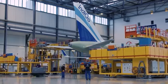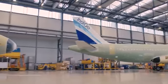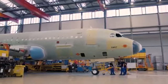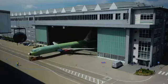The team has kept to the 2-day takt rate. The planes can all move forward one position, and the aircraft at the front of the line now leaves the hangar. It will be transported to another hangar where the engines will be mounted.